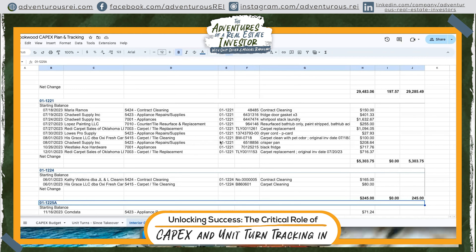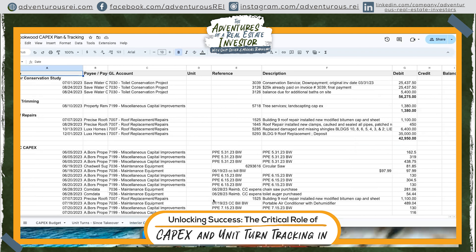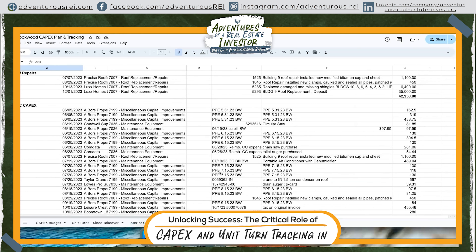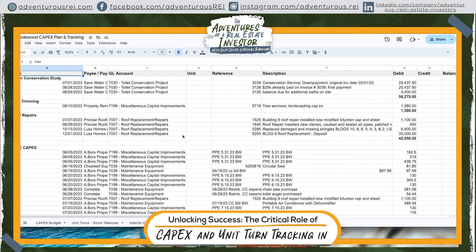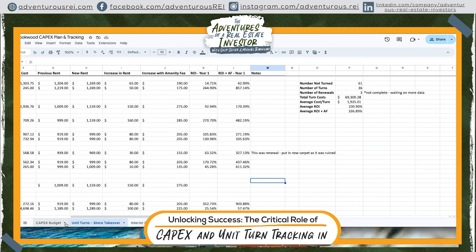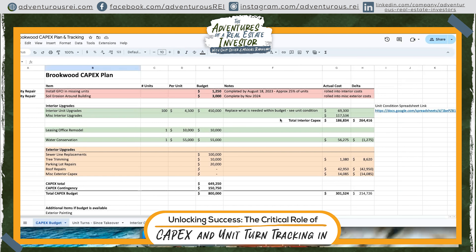Tracking into unit turns — I track every single line item for every single unit, so I know exactly how much it costs to turn each one and can get an average cost of turns. Another tab is for other CapEx items including exterior things and miscellaneous CapEx like hiring someone for CapEx projects — that labor can be capitalized — plus equipment purchases, tree trimming, water conservation studies, and roof repairs. Everything feeds back to the main CapEx plan tab, so I know exactly where actual costs are versus budgeted costs and what the delta is. I update this every month.